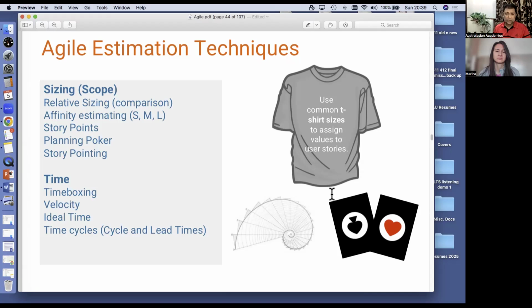So three story points, yeah? In an affinity estimating context, building a balcony could be a large size story compared to building a pool, which is a smaller size story, right? But building a pool in a balcony with a glass gallery or a screen, if you like, could be the whole big task. And then they break it down to small achievable chunks. So planning poker, we can come back to later.